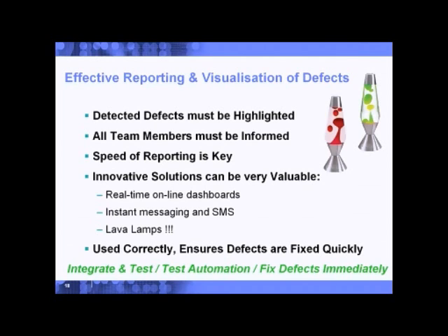So, what's a lava lamp got to do with testing? Well, again, another one of the things that Dave Evans reported was setting up an automated integration and test system which was also wired up to a pair of lava lamps, one red, one green. Whilst the project was happy, whilst builds were coming in, they were tested and everything was going successfully, green lava lamps sat there in the middle of the project, bubbling away merrily, and everybody was happy.